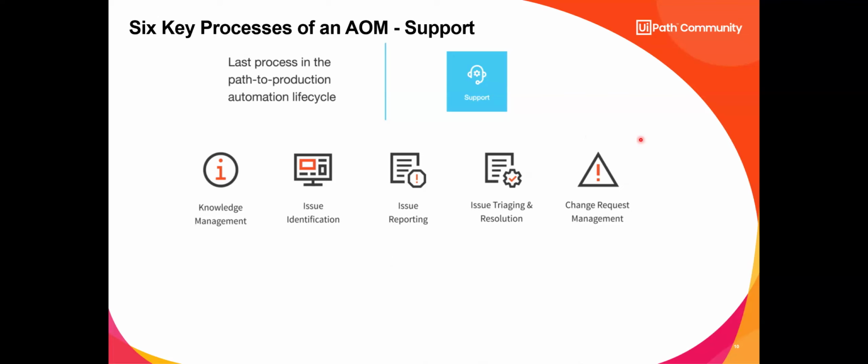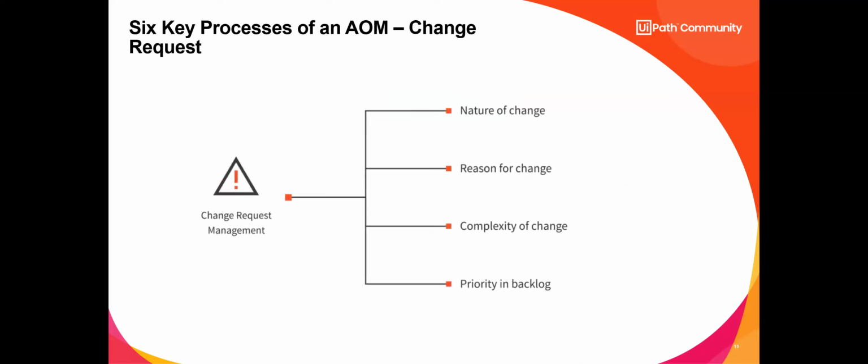And here's where we come into change request management. You'll see on this next slide that change request management takes on a different function here. If you remember when I talked before, we talked about change requests. We had standard, normal, and emergency. Normal changes would be something that required approval.